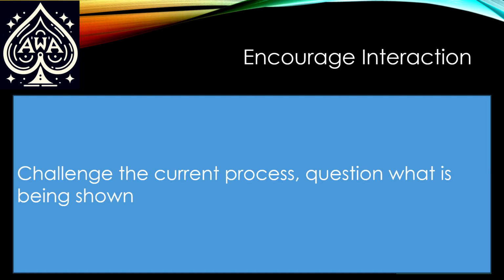This is really for the customer, okay? Again, I will tell you, as part of the implementations that I propose and that I do, I make an implied assumption, or actually a specific assumption, that you will accept the standard practice, and that is the Oracle Modern Best Practice. Those are very high level. So typically, before we prepare for these sessions, we will bring process flows. Those should be fairly detailed. They should discuss what should happen, by whom and by what, within the system. They should have been signed off on before you get to the process playback.